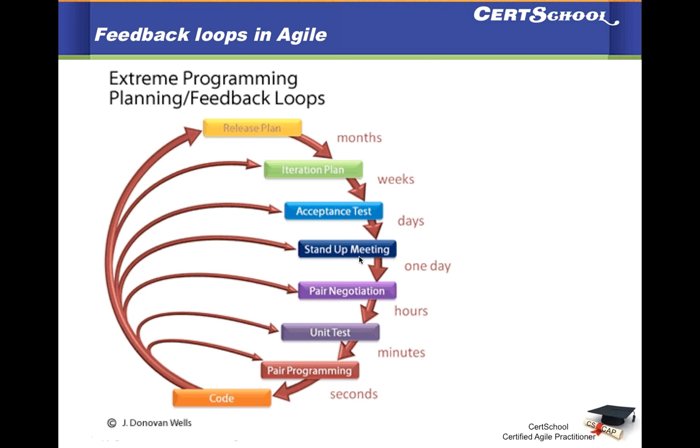Not only that, one of the agenda items for stand-up meeting is to find out if anyone in the team is blocked. If there's something that is blocking somebody, it comes up in the stand-up meeting, and a facilitator or a scrum master or an agile coach or a manager can take action to make sure that the member who's blocked is able to unblock himself or herself, or if any breakout session is needed, if there is some kind of collaboration that is needed from inside or outside the team, and be able to discover any problems or any risks ahead of time. So the agenda for stand-up meeting is not status reporting. It is knowledge sharing.